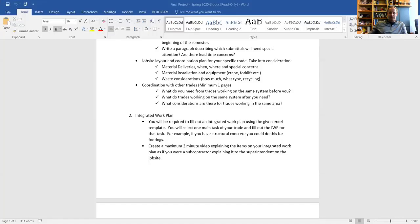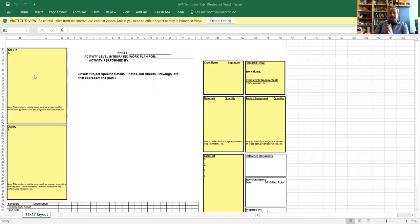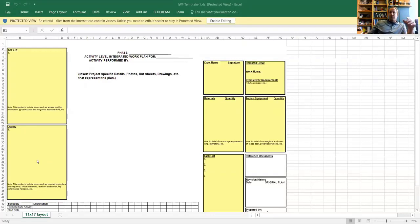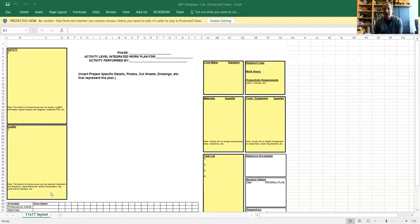There is a template in BB Learn for you. This is the integrated work plan — it's a pretty big document. In the upper left corner you'll see Safety. I want to know any safety concerns specifically for that task. If it's spread footings, you'll have open trenches, equipment like backhoes, and concrete and rebar safety concerns. The next box down on the left is Quality — what are you going to do to make sure the quality is there? It says to include required inspections and frequency, critical tolerances, levels of expectation, and key performance indicators. You'll get that from your specifications.